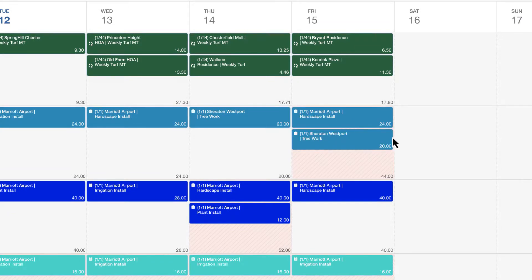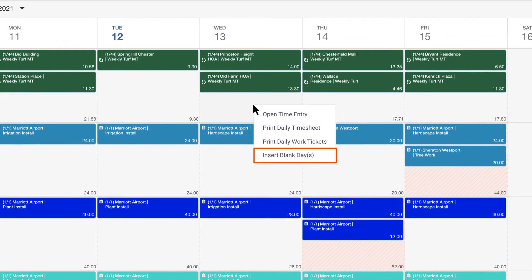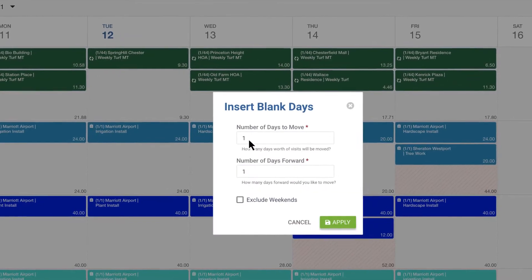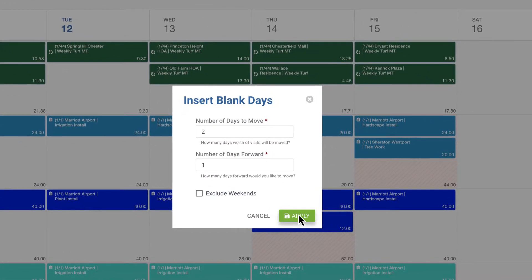Do you need to push an entire day due to weather delays? No problem. Quickly insert any number of blank days to move the schedule forward.